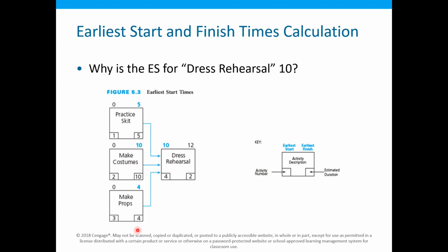Therefore, the earliest start time for the dress rehearsal activity, which is represented over here, will be 10 days. It cannot be earlier than 10 days, because if it is earlier, that means activity 2 may not have been completed. This activity can only start after activity 2, so its earliest start time will be 10 days.